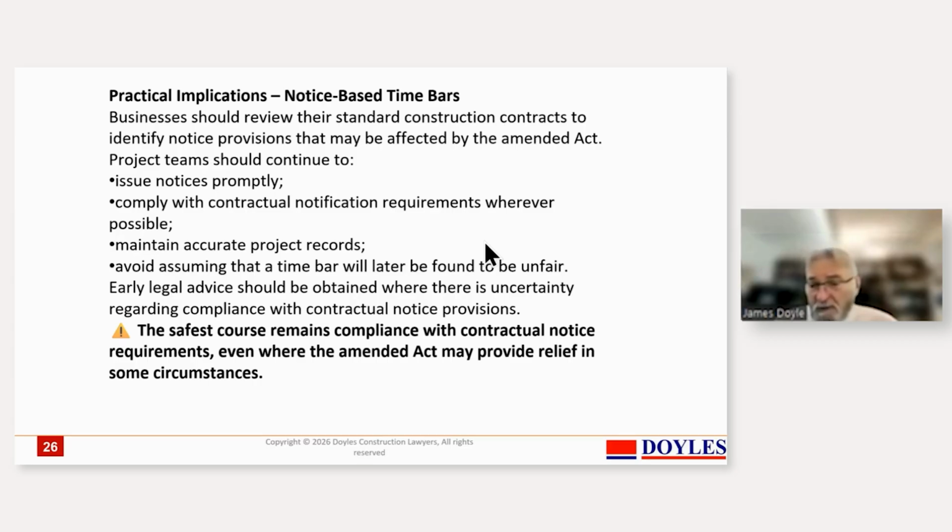People must get to the stage where there is at least a weekly report on matters that have impacted them, on variations, on time extensions, on other impacts that have affected them, so that somebody can manage these time bars and the notification requirements. The other thing to remember in terms of construction contracts is that for the value of the contract, there is amazingly little reporting to the principal, to the person who's got to pay it.